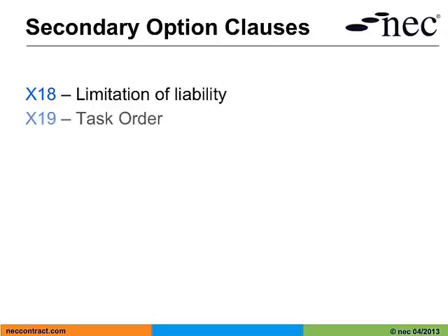X19 provides the employer with the facility to control work on a task-by-task basis. Things like reactive works or emergency works or minor works can all be instructed using X19.